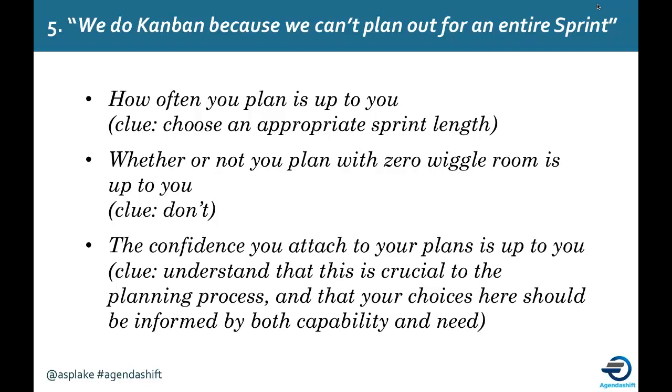The last bullet I put, this is just again copied from the blog post. The confidence you attach to your plans is up to you. Just because you plan to do something doesn't mean you will do it in exactly the amount of time that you hope. If you think that just because you deliver 10 story points worth of work in the last sprint that you will inevitably deliver 10 story points worth of work in the next, you are setting yourself up for failure. Half the time you're going to be wrong.